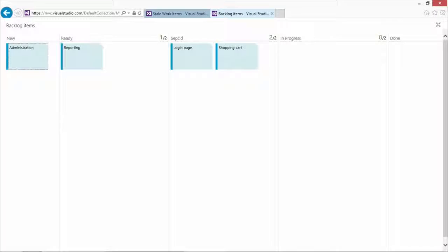And one of the things I want to point out is as I was doing that, you might have noticed that some things were changing colors as I moved them around and dragged them and dropped them. This little number that we got configured up here at the top is called a work in process limit. And that's just a simple visual cue, which is going to allow us to make sure that we don't create log jams or roadblocks in the flow of all this work. So if I've got everything spec'd, that means nothing's in progress. Or if I've got too many things in progress, I'm probably not getting any of those done. And so we give you some nice little tools there to adorn the board with those visual cues to make sure that you can keep your flow very, very healthy for your project and for your team.